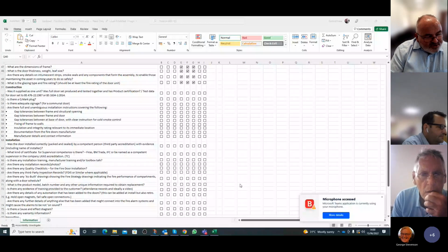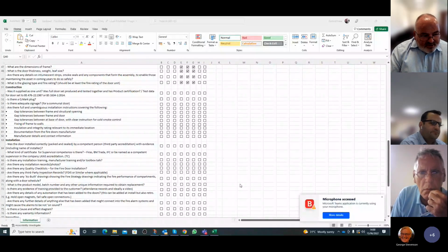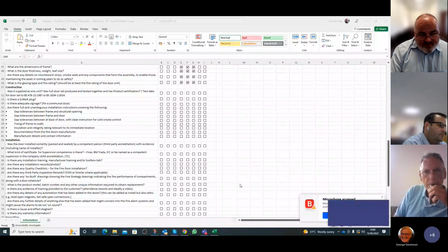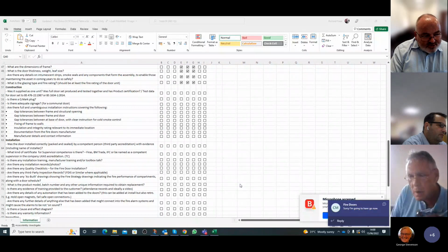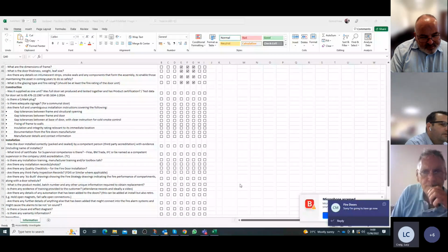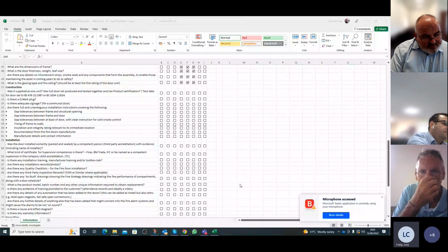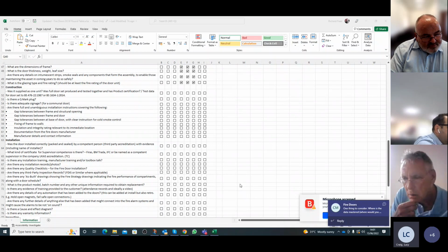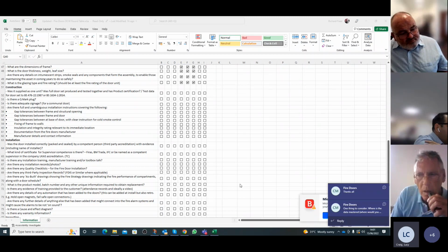I keep going back to the main contractor. From a design and build aspect, that would be the main contractor's responsibility to be able to say the structural opening is this size, so the door needs to be what size, working with the manufacturer to make sure the opening sizes are correct. But they'd be reliant on the designer to establish the intent, and then it's about site surveying the structure and making sure the adjacent trade contractors are within tolerance. In principle, the main contractor is responsible overall, but they've got the other stakeholders, like the consultants and the trade contractors, on their own appointments and contracts to deliver that information.